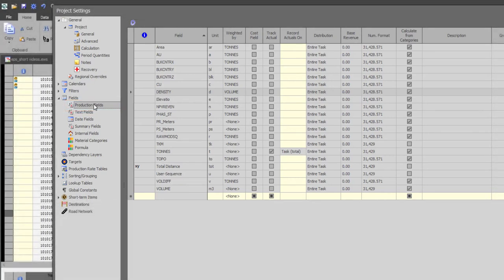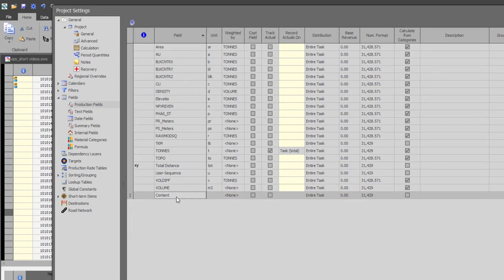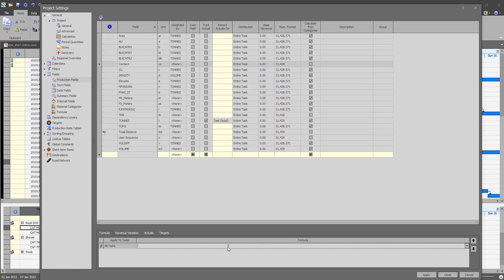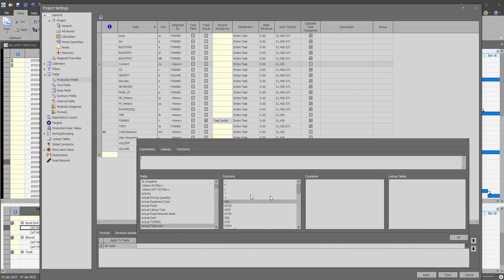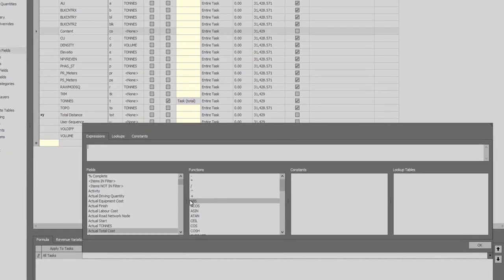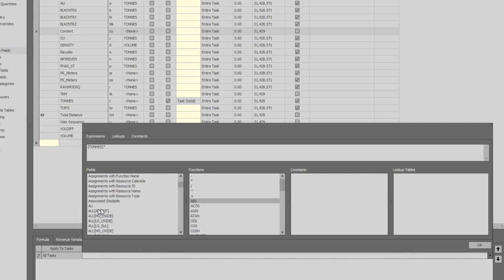In this example, I will create a field called content in order to calculate the metal content of each task based on the task tonnage and grade. I will add a new field called content and under the formula option, I will define the formula as tonnage multiplied by the grade.